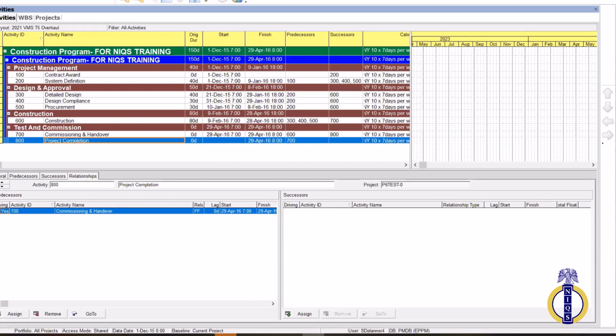I know under Microsoft Project they call it lag and lead, but in Primavera they have just one terminology for that, which is lag. But sometimes you can actually use a negative lag to reposition an activity where you want. So if you can add more explanations in that regard, then when they encounter such in their work, it will not throw them off balance.